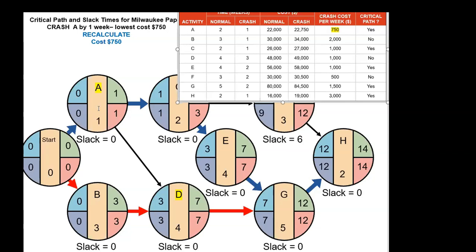So we select, you remember the process or the step, from each critical path, select the lowest cost activity and crash it similarly. So we crash one from the blue color and one from the red color. From red color, we selected D because it has the lowest cost, 1,000. From blue color, we selected A because A had the lowest cost, $750. So copy this down here.